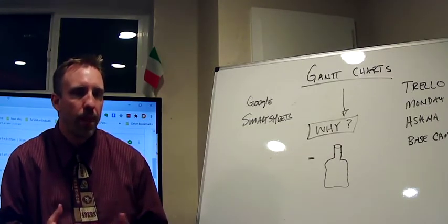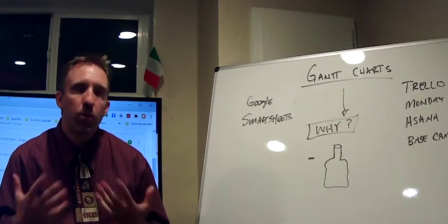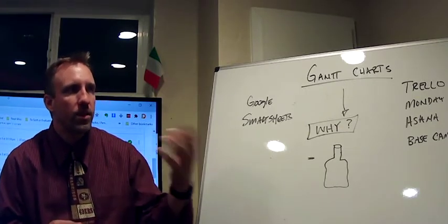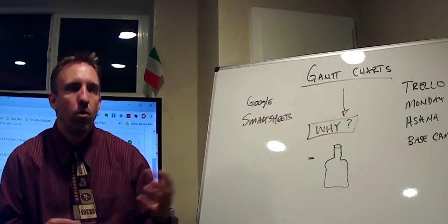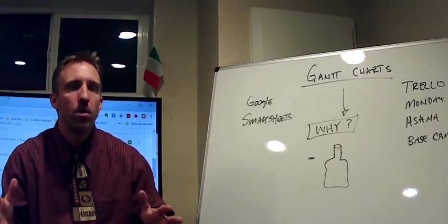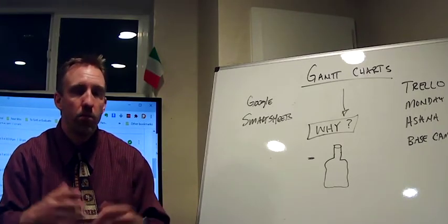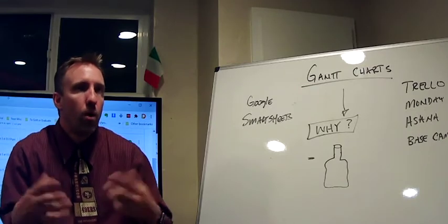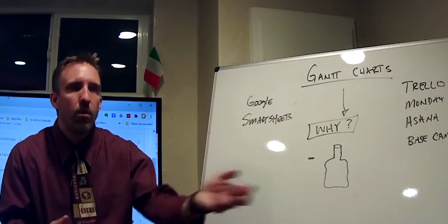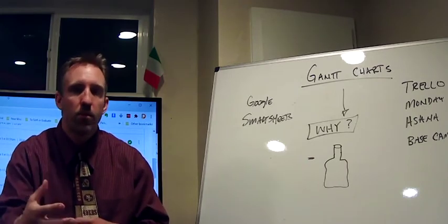We also find out through Gantt charts that maybe we're bottlenecked with resources, right? Maybe it's a single individual who is tasked with something pretty significant that nobody else knows how to do. Well, what if that person gets sick or isn't really as good as they say they are, right? What things could we do now to mitigate that? Well, we might bring in some consultants, right? We might teach someone else.